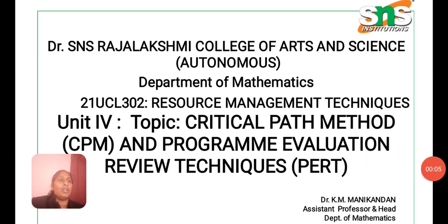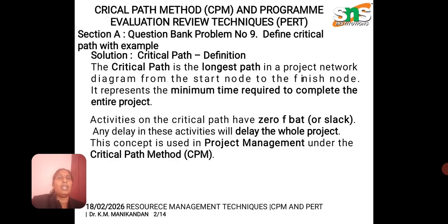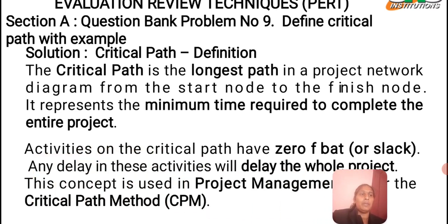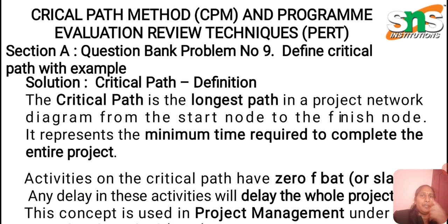So today we are going to discuss the topic critical path method and PERT. Some of the definitions and problems we are going to discuss in the resource management technique. Before going to the problem, we are going to say what is meant by critical path. The critical path is nothing but the longest path in the project network diagram. We have to connect from the start node to the finish node, and it represents the minimum time required to complete the entire project.